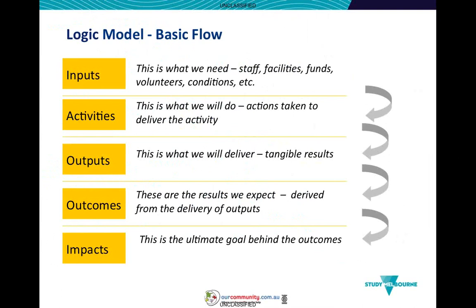The other really great use for the logic model is that you can make sure that you've included all of the budget items. So the budget items will come from your inputs and activities in your activity plan. And again, really reflect on those outcomes that you are proposing to achieve, which are called measurements in the activity plan, to really make sure that they're achievable in that time frame.